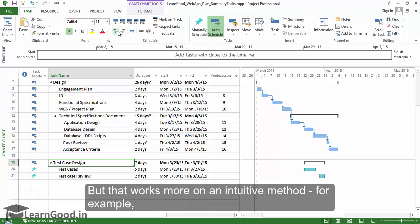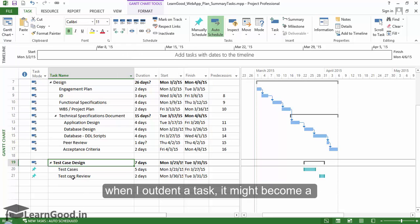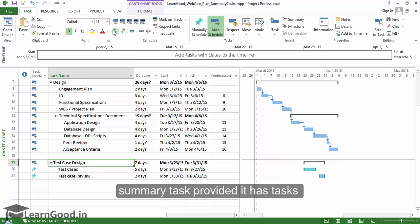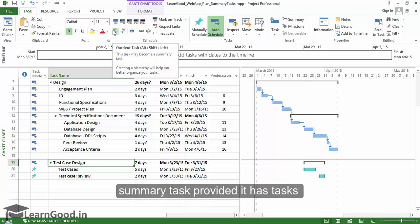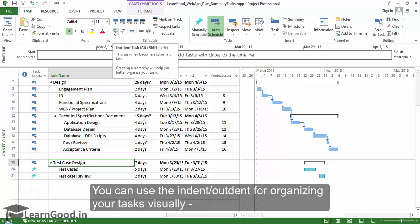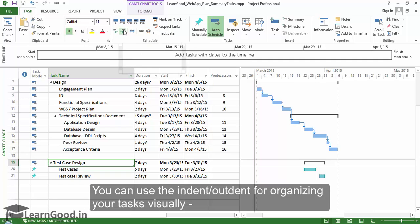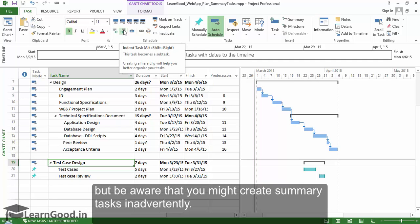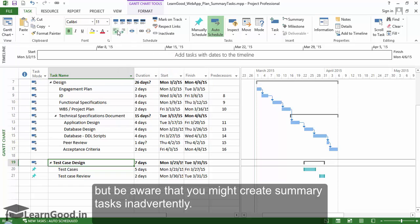But that works more on an intuitive method. For example, when I outdent a task it might become a summary task provided it has tasks immediately following it. You can use the indent-outdent for organizing your tasks visually, but be aware that you might create summary tasks inadvertently.